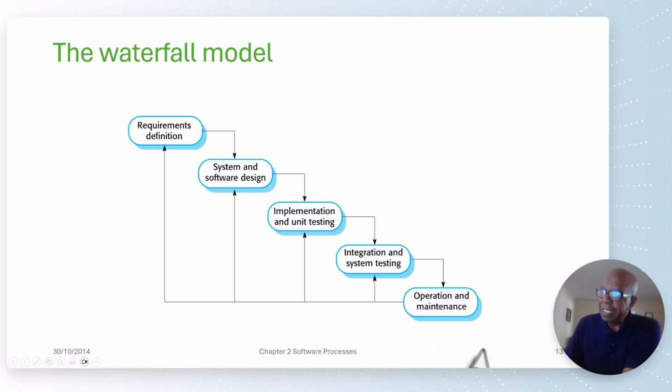Well, you say, that's not very good. That is true. But the waterfall model is still one of the main models used in software development today. The reason is that once I have all my requirements completed, I can take those requirements and break them up. I can send part of them to California, part of them to New York, part of them to Texas, part of them to North Carolina, because they are basically complete and intact. Another thing I can do with the waterfall model that I can't do with the other models is predict and give the user some timeline.